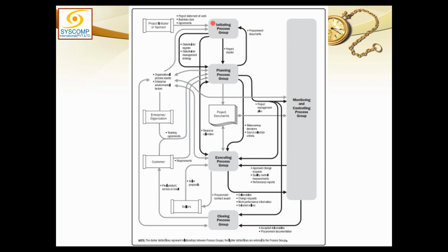When he gets into the initiation, he is the only person in the project. There is no one else in the project so far. He will assign the project manager, write the project charter, and give that project charter to the project manager, and that project charter will authorize the project manager to mobilize resources for the project.